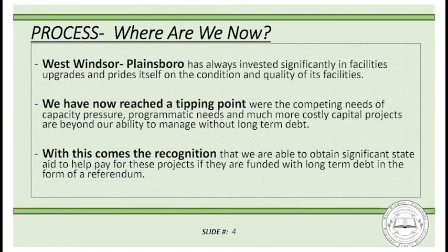You know, our colleague that was at this table for many years, Mr. Shannick, used to talk about the idea of depreciable assets, and the district has about $240 million worth of depreciable assets when we talk about the actual facility, not the land, but the facility. And he talked about a replacement cycle, a 40-year replacement cycle, and the idea that if you take $240 million divided by 40 years, you'd have about $6 million worth of capital projects per year. But even at that clip, you'd inevitably have projects that are more expensive than you can handle.